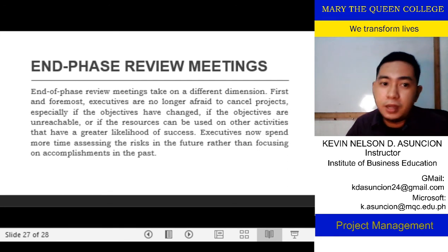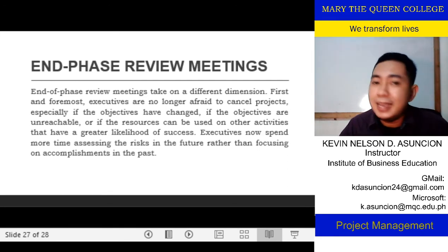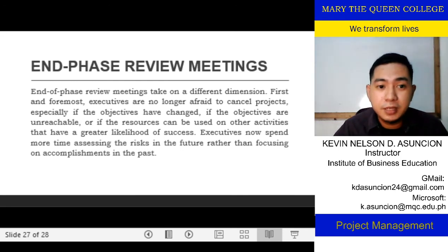End phase review meetings take on a different dimension. First and foremost, executives are no longer afraid to cancel projects, especially if the objectives have changed. So if the objectives are unreachable, or if the resources can be used on other activities that have a greater likelihood of success, lilipat sila, papalitan nila yan. Executives now spend more time assessing the risk in the future rather than focusing on accomplishments in the past. So what you can do in the future is the end phase review meeting.